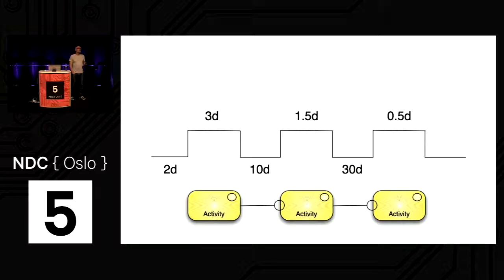So if you haven't come across value stream maps before, the steps represent value-adding activities. Maybe I'm developing something, I'm designing something, I'm testing something. And the gaps represent wait times. Essentially, you get this from measuring a piece of work and how it flows through the different stages in your process. As we can see from this one, value-adding activity, this is actually from a real